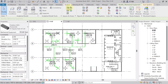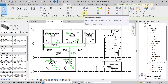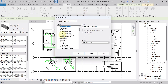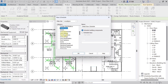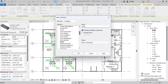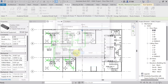In the Analyze tab, go to Report and Schedule panel and hit on Schedule or Quantity. Under the category, select Ducts because we are preparing the BOQ for duct. In the name field, write 'Supply Air Duct SAD BOQ Bill of Quantity', then hit OK.